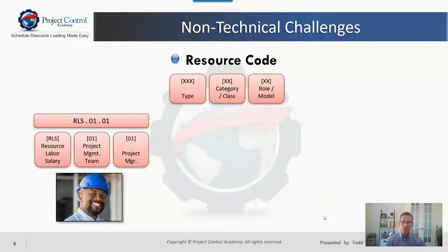But then when we started pushing that over into P6, every one of those resources with the unique IDs got created in P6. So we had 6 to 8 of everything: project manager, superintendents, foremen. I mean, it was crazy. And it was so bad, we had to essentially set up a new instance of P6 just to kind of clean it up. So anyways, real important to kind of come up with a strategy.